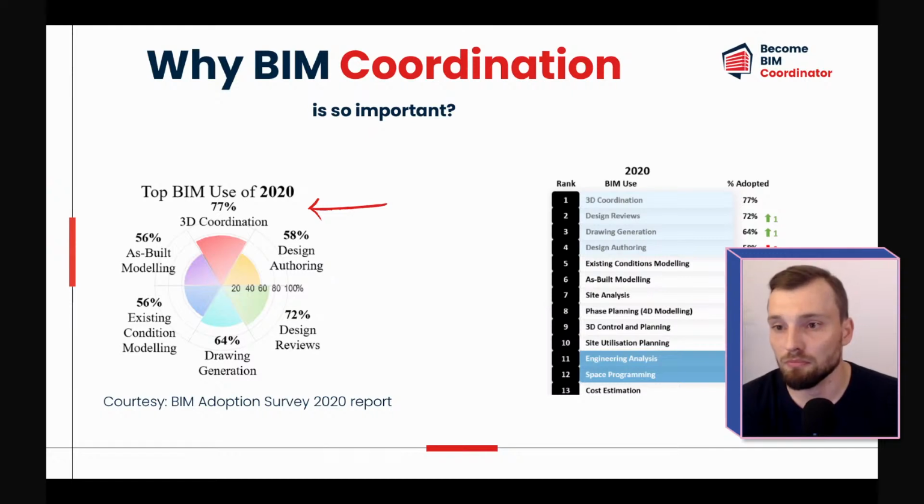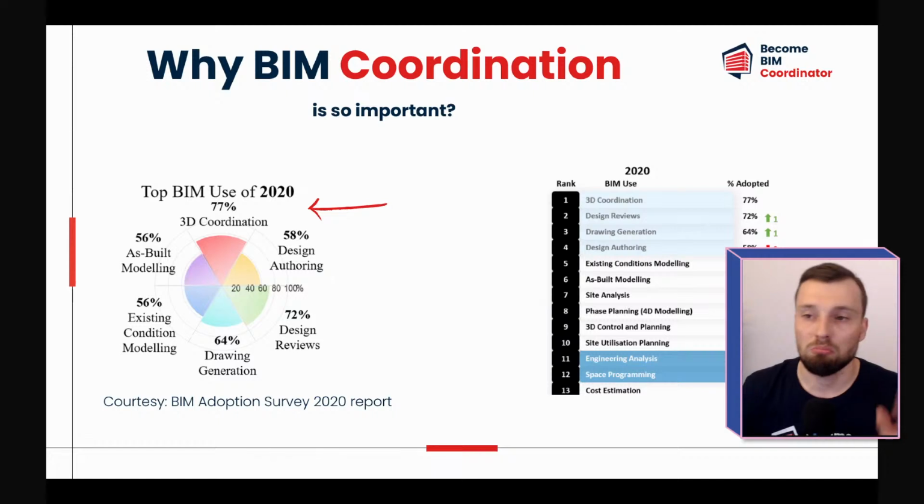Okay. And then we can plan using the pull planning method to know, okay, if the date is 2nd of December, then I need to perform the model coordination and data coordination like 3 weeks before it. Okay. So me as a BIM coordinator, I'm inside all these three parts. Okay. Got it. Gotcha.